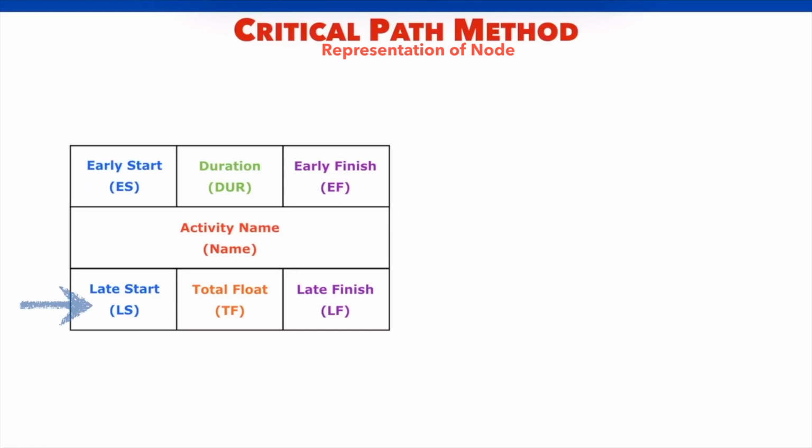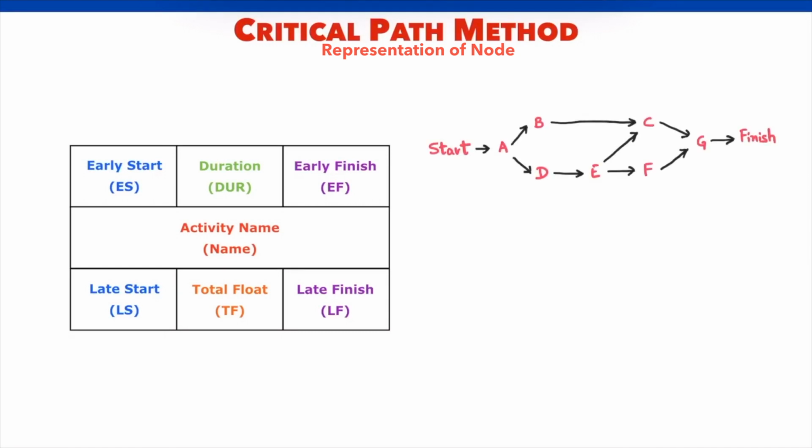Early start and late start, early finish and late finish. Why do we have these multiple starts and finish dates for an activity? Let me explain. If we go back to our example, the network diagram clearly shows the relationship between activities. Activities are interrelated. Due to interdependencies, some activities might have flexibility in schedule. Instead of a fixed start date, there can be a range of possible start dates, with no impact on project start, project finish, or any other key milestone.